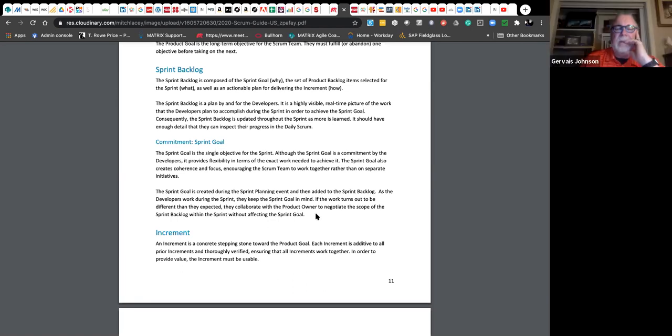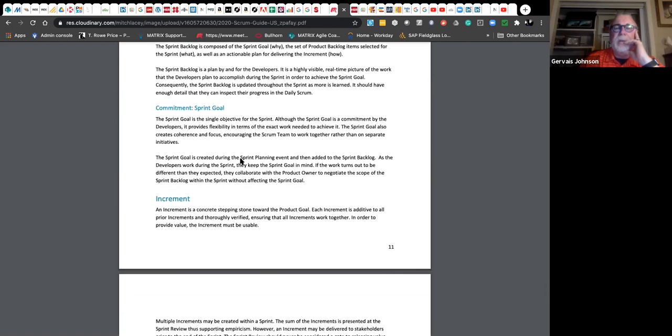And it says here, the sprint goal is created during sprint planning. Okay, so you agreed to it during that event, right? And then during the daily stand-ups and so forth, that's what they're recommending, that we're always asking, here's a sprint goal, where are we at?